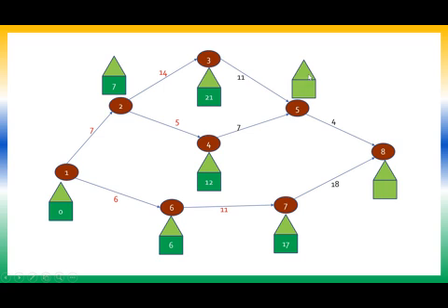Okay. Now when I am supposed to compute here, there are two possible inputs. 21 plus 11 I'll get a 32 and 12 plus 7 I'll get a 19. So the max of it is 32. That is computed. Then 32 plus 4 is 36 is one option. 17 plus 18 is a 35. So out of 35 and 36, 36 is maximum. I have written that. So whatever value I get here will be the initial value for the triangles. So I am copying 36.